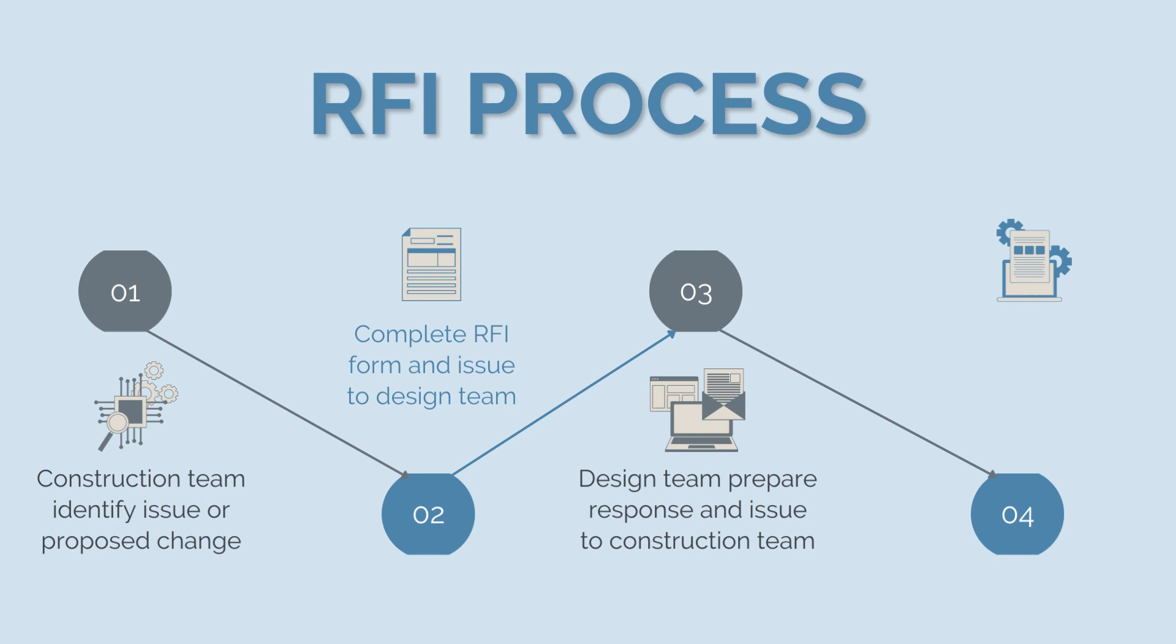Once all parties are happy with the RFI response, construction works can proceed. The design change associated with the RFI will be captured as a redline markup on the drawings and eventually included in the as-built drawing set. The RFI can now be closed out.